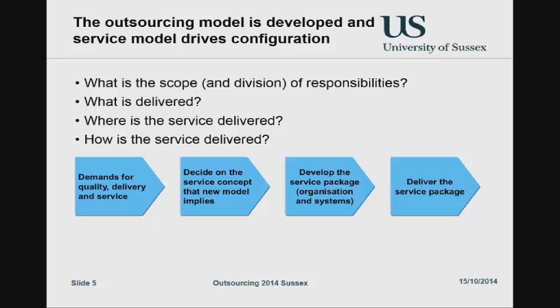Now, rather obviously, those subcontractors may not have in place the full processes and techniques that Hewlett-Packard, in this case, operate. And that's something which Unilever should be very aware of before they let the contract. How is the service to be delivered? Are you the only people to be delivering this?